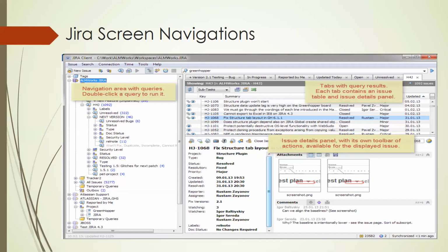For us, when we define it, it becomes one user story. But when we are trying to narrate the same thing in terms of Jira, we have to break that into separate issues. Because the developer, when they're working on this particular aspect, will first create a framework for the application: there has to be a registration column where anybody can register, which will be mapped to the database. Parallelly, the next issue is how the user login has to be created